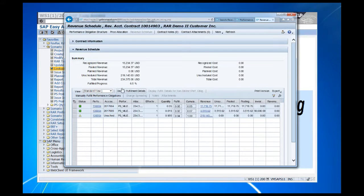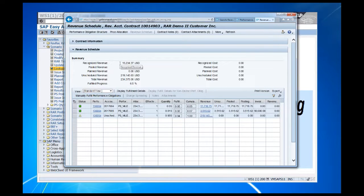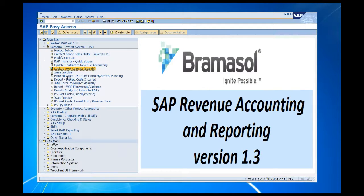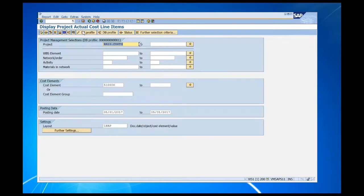Let's take a look at the revenue stream — we're going to focus on one performance obligation so we can clearly see the end results of my results analysis run. About 6.5% green means posted — I've done some posting here. There's been an invoice for $50,000. However, based on my percentage of completion, I'm only able to recognize $15,234 of this particular performance obligation.